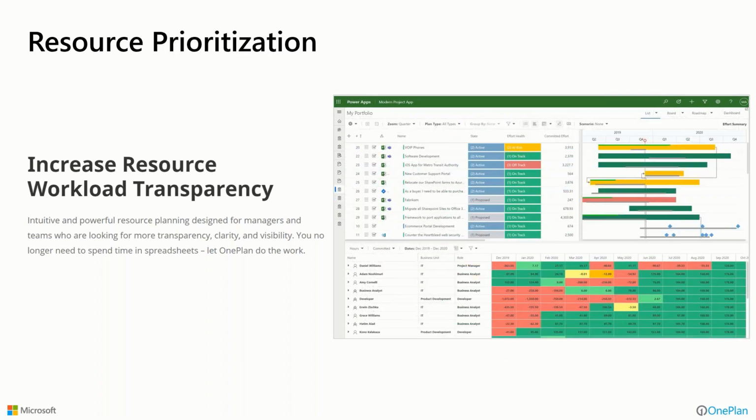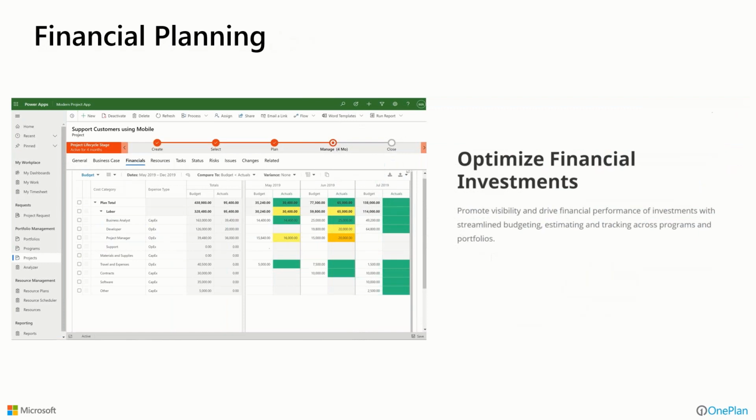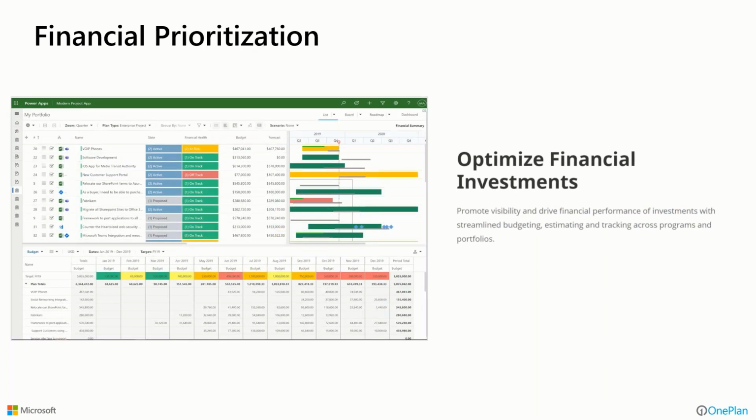Resource prioritization, saying, do we have the resources that we need to fulfill on the portfolio that we're thinking of doing, or do we have to unselect lower priority projects or move things out in time and evaluate these as what-if scenarios? Financial tracking with detailed cost categories and tracking even budgets and revised forecasts and actuals, even forecast benefits and revenue, and basically look at those in the detailed fashion in the categories that make sense for our organization, possibly even for integration with your financial system. And having prioritization and what-ifs using the financial constraints as opposed to just the resource constraints we saw just earlier.